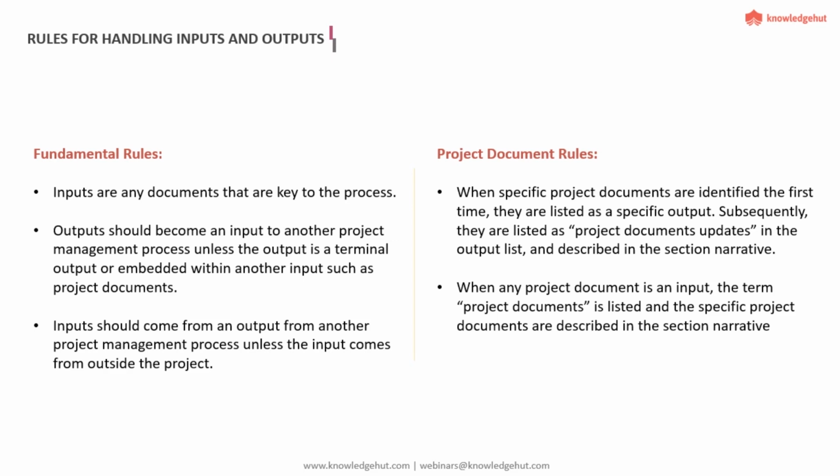Now these two documents, the example that I gave you here, agreement or maybe a business case, are not prepared as part of the project. These are already prepared before the project has begun. So you will have some inputs which might be coming from outside the project, and then after that I think most of the inputs would be coming from the outputs of some of the processes. So one output of a process becomes an input for the next process. I think that's what they're just trying to make more clear here.